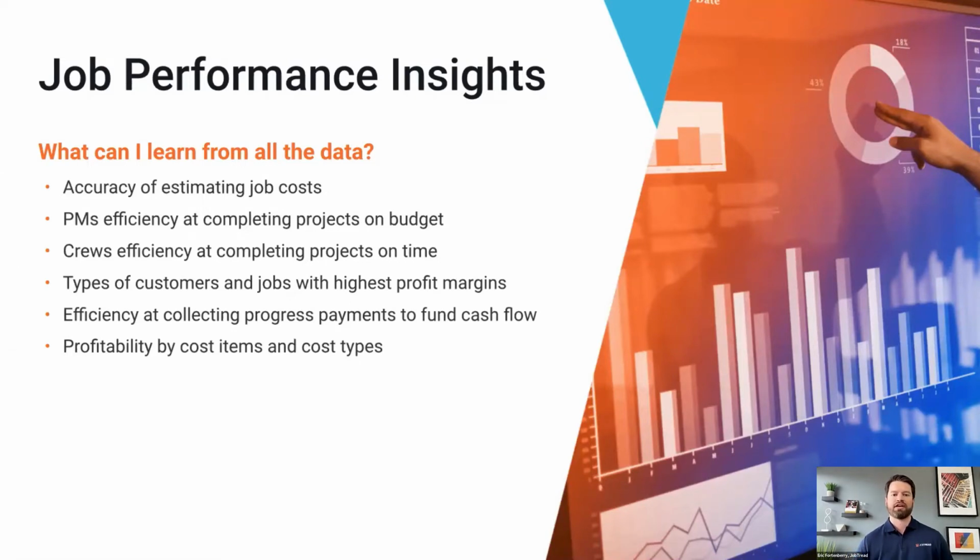You need to make sure that you're tracking your profitability on a line by line basis. I'm not saying you got to track every single box of nails and screws, because that really isn't going to ultimately make a huge impact. But those key cost drivers, you need to break those out, and you need to make sure that you're understanding your cost and that the cost you're putting into your estimate is the cost that you're actually paying.